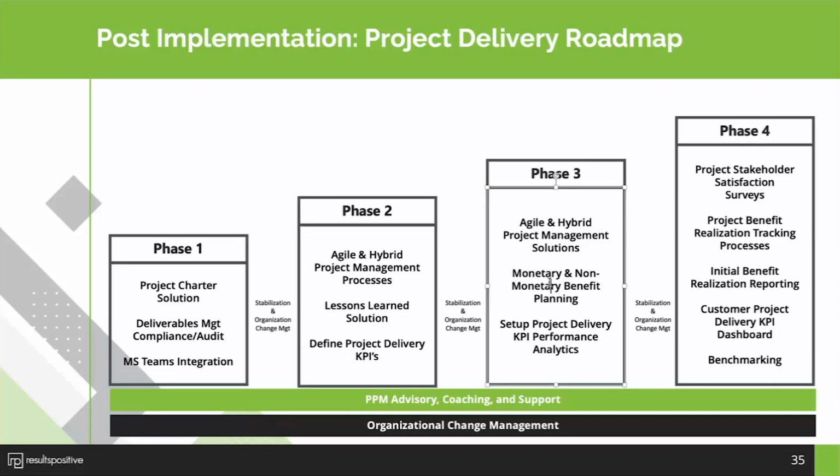So then we've got the benefit plans. They might want to start estimating benefits associated with project investments, setting up additional KPIs for project delivery, doing some project stakeholder satisfaction surveys, start doing project benefit realization tracking. We see that as a journey. So you do some initial benefit realization reporting, and then as you get more mature, you can add more reporting